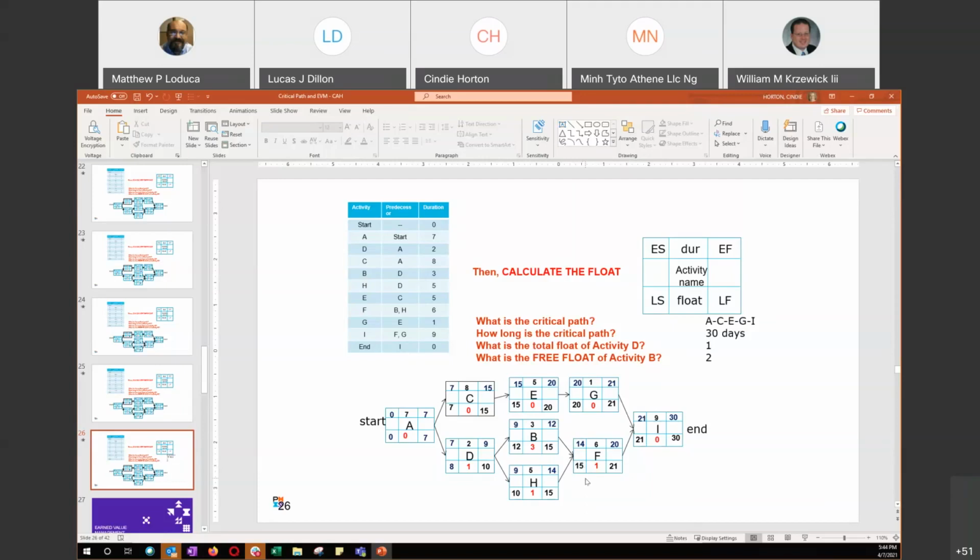It would start on day 16, and so you would end up being on day 22, and it would end on day 31. So you would actually end late if you exceed the total float. But if you only exceed the free float without exceeding the total float, all you're doing is delaying F, which is not a big deal because you have float there as well. Does that make sense? I follow you now. Thank you.